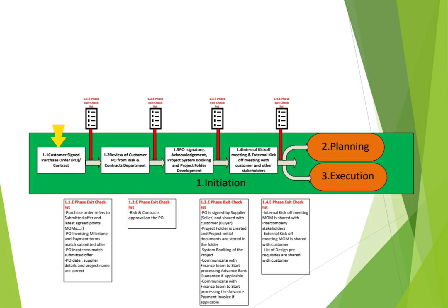You need to check the purchase order, that it is referring to the submitted offer and the agreed minutes of meeting. As we mentioned, the PO invoicing milestones and payment terms must match the submitted offer. The PO Incoterms, whether it is delivery duty paid or ex-works, all of this needs to be checked quickly by the project manager.